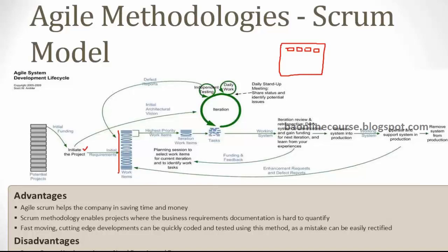If there are, let's say, 100 features which I want to develop in a system, okay? Now those 100 features would have taken me 1 year to design, develop, and do everything, right? Now those 100 features, if I have broken down into, let's say, 5 iterations, 5 sprints, right? So rather than 1 year, it would have taken what? Let's keep it as 6. So rather than 1 year, it would have taken us 6 months, 2 months each to deliver each one of them, right? And see, a lot of time we won't use all features equally, right?